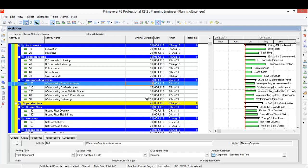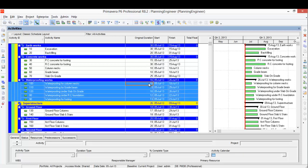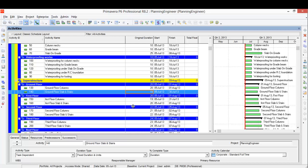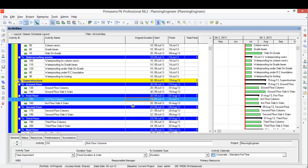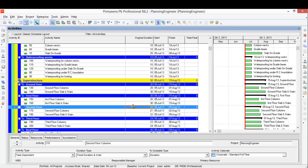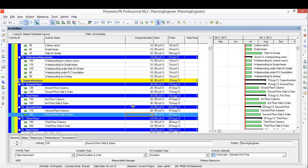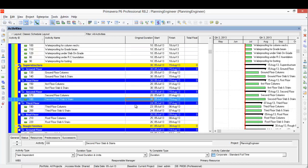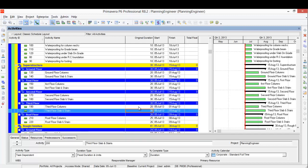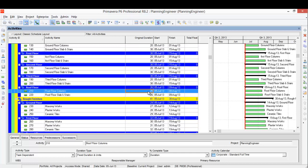Waterproofing, let's say 10 days, and I'll apply existing days for all the activities. So I can select them, Control+E will fill down the duration. Ground floor column: let's put it 20 days. Stairs: 30 days. And I'll apply this for the remaining ones. 20 days for column, one month for slab.